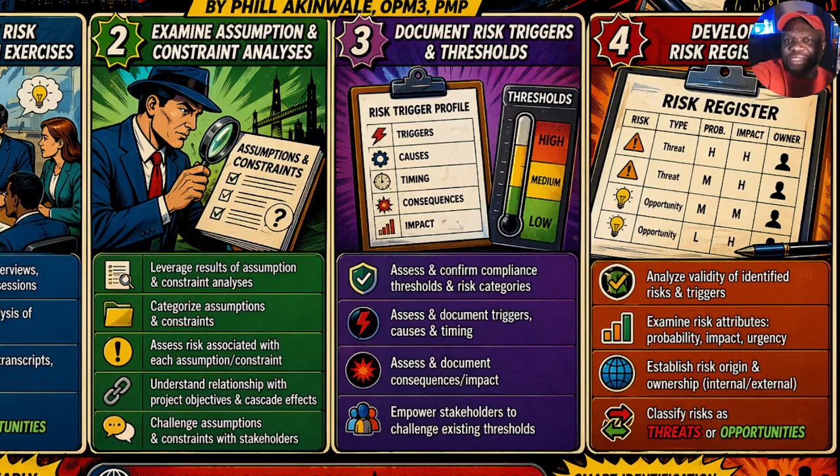But when you get to the qualitative risk analysis, you're going to find out that it could be looked at as a high, medium, low view to the risk. But you can also go a step further and you could use a numerical value from 1 to 5 or 1 to 7 or 1 to 10, depending, for both the probability and the impact. And as a result of whatever you score the probability of the risk occurring and the impact, you have two numbers, a 1 and a 5, for example. Probability of 1, not likely, but if it does happen, the impact could be a 5. You multiply those and you get what we call a risk score.